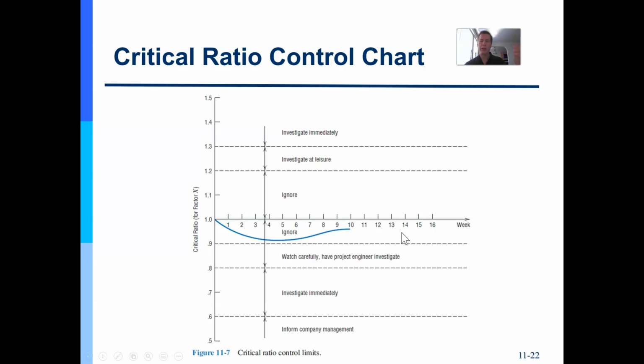That's okay. As long as it ebbs and flows within our upper and lower control limits, we are still in control. And I mentioned the rule of 7. If I have 7 data points in a row that does not change within the natural variation that we've defined, that actually becomes a problem for me. Because if 7 points in a row aren't changing direction, it tells me that it will be changing my mean. And I didn't intend to do that, right? So that I would call an error, and I would assign a code to it, and I would do root cause analysis on that. And of course, anything that falls above or below the upper control limit or the lower control limit, I would also assign a cause code to that and do root cause analysis, figure out why, and make the recommended changes.